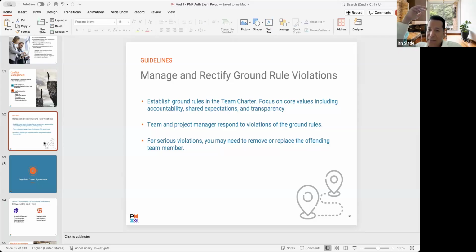You guys still with me? So you do that for every stakeholder. What's your non-negotiable? What's the aspirational? Floor, ceiling. You go around and you do that, and then you look at where the floors are different, where the non-negotiables are not aligned, and you focus on rectifying that. Once you can rectify the non-negotiables and see if you can adjust, negotiate, then the ceiling is no longer an issue. So in the case of Stanford v. Adobe,